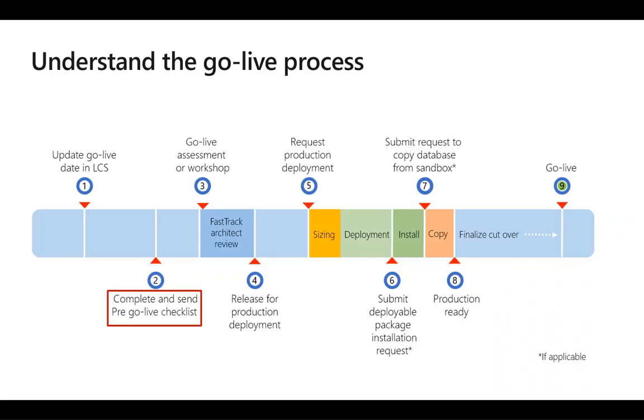All Dynamics 365 for finance and operations customers must complete a go-live assessment with the Microsoft FastTrack team before their production environment can be deployed. These assessments should be successfully completed before we request our production environment from Microsoft. The third step is project assessment, FastTrack essential.